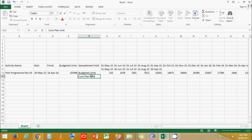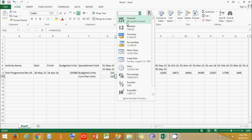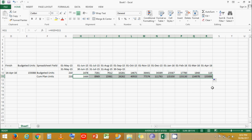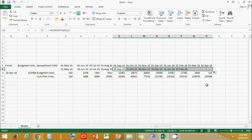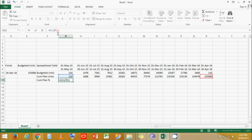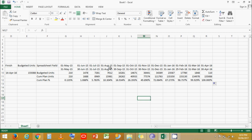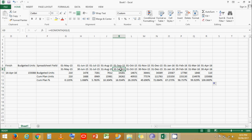Now let's convert this into cumulative budgeted labor units. Let's convert the values into numbers and stretch the formula across all months. Now let's convert this into cumulative plan percentage: cumulative units divided by the cumulative total, with a horizontal lock applied. Let's convert it to percentage with three decimal digits and stretch the formula. We can see that at the end of August the cumulative plan percentage is 10.304%, and at the end of September it is 16.934%.